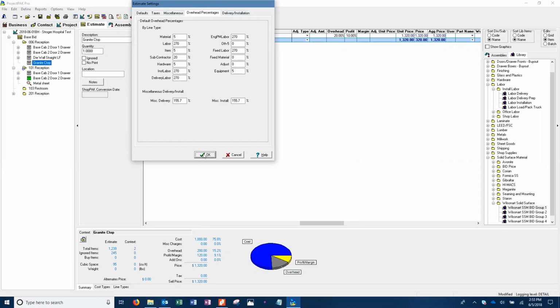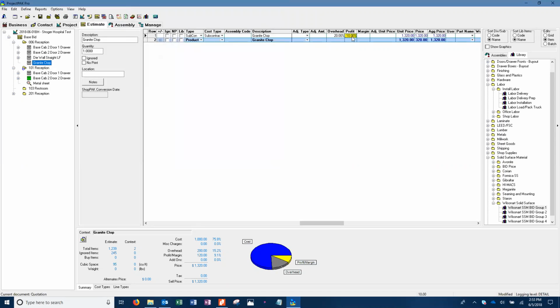So shouldn't it be 1,200 if that's 20%? I mean, don't forget your profit. That's what we just mark. I guess we have to change that. We just do a straight 20% markup on buyouts. Okay. So say okay, and let's remove the profit. There you go. That's simple. Yeah, if you want to add something in, you can certainly do that.